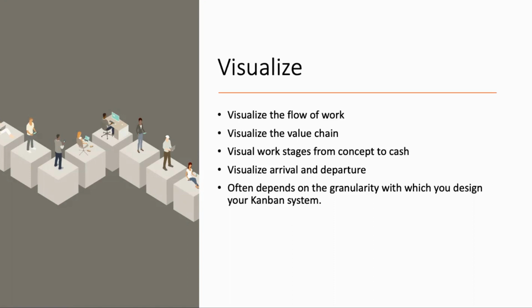Now, what are those stages? Those stages are all the dominant activities that you have to do to complete that piece of work. People handovers, these are not dominant activities. They can be on the line. Any dominant activity that is changing the state of the work is your workflow stage.